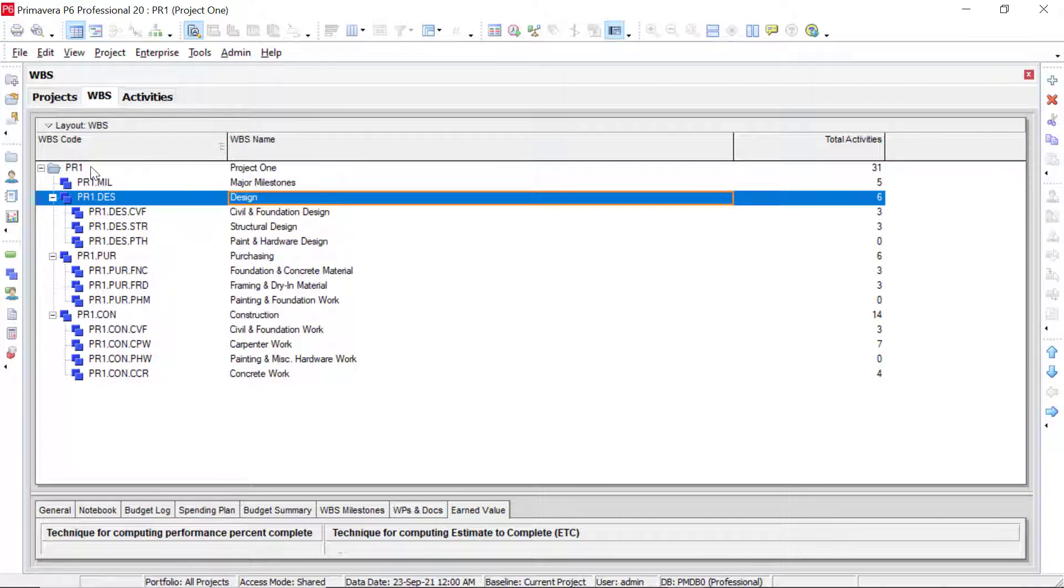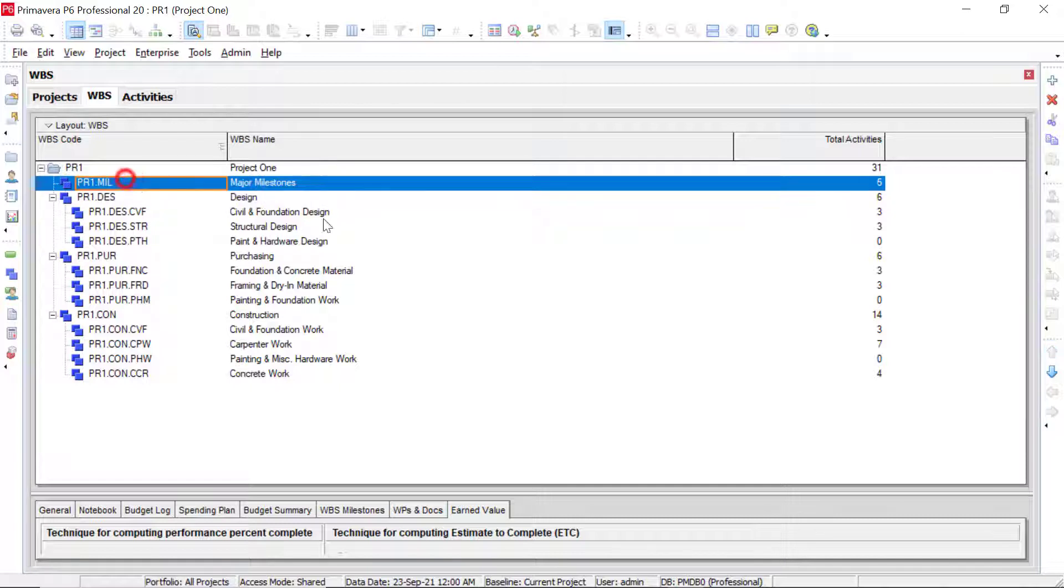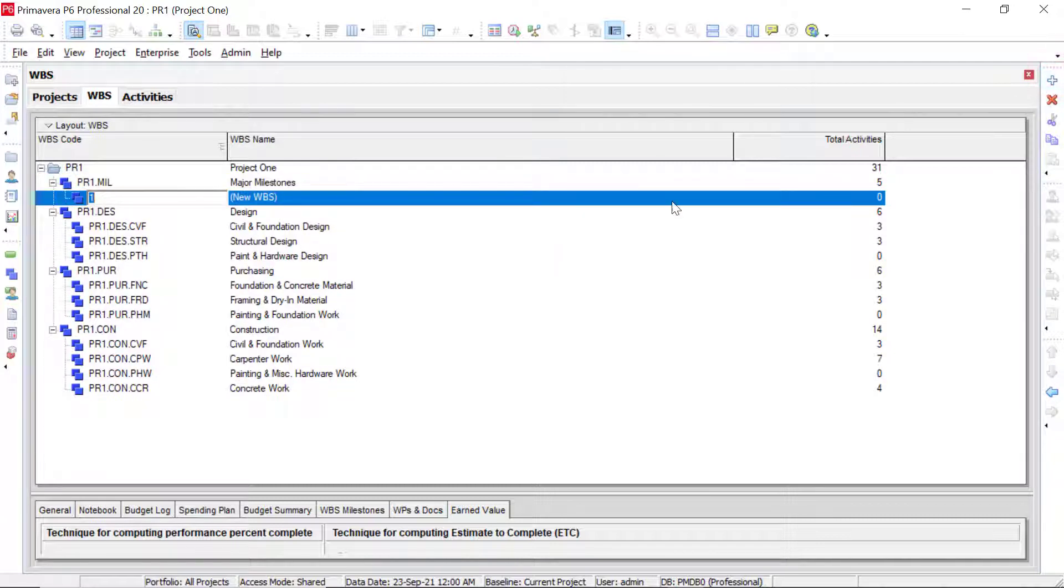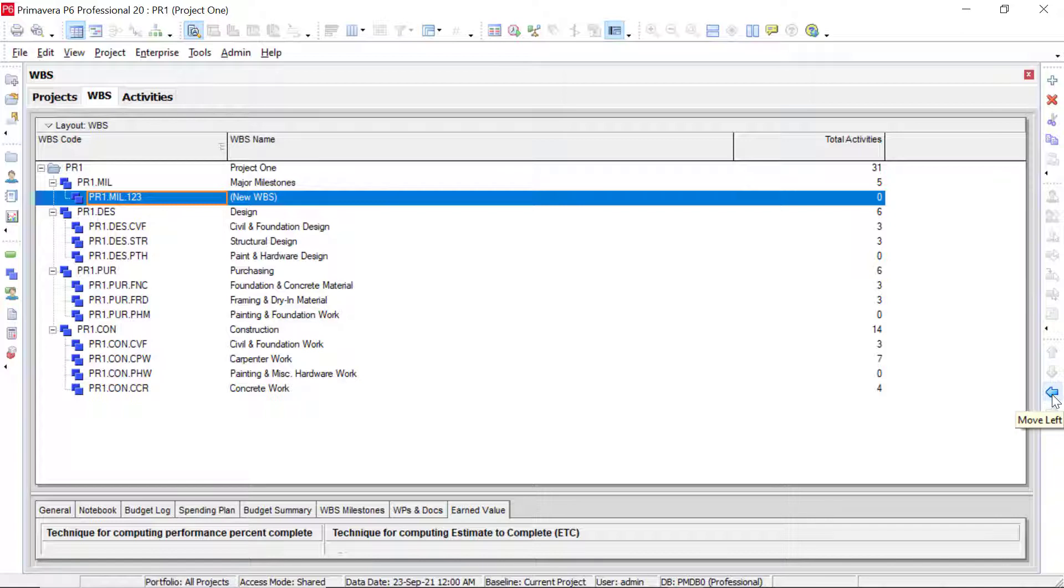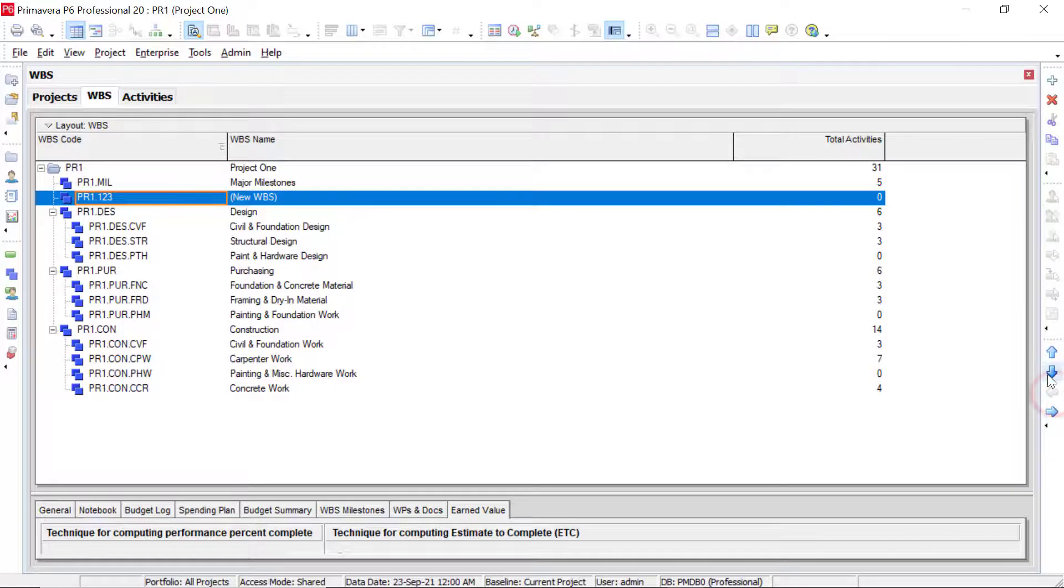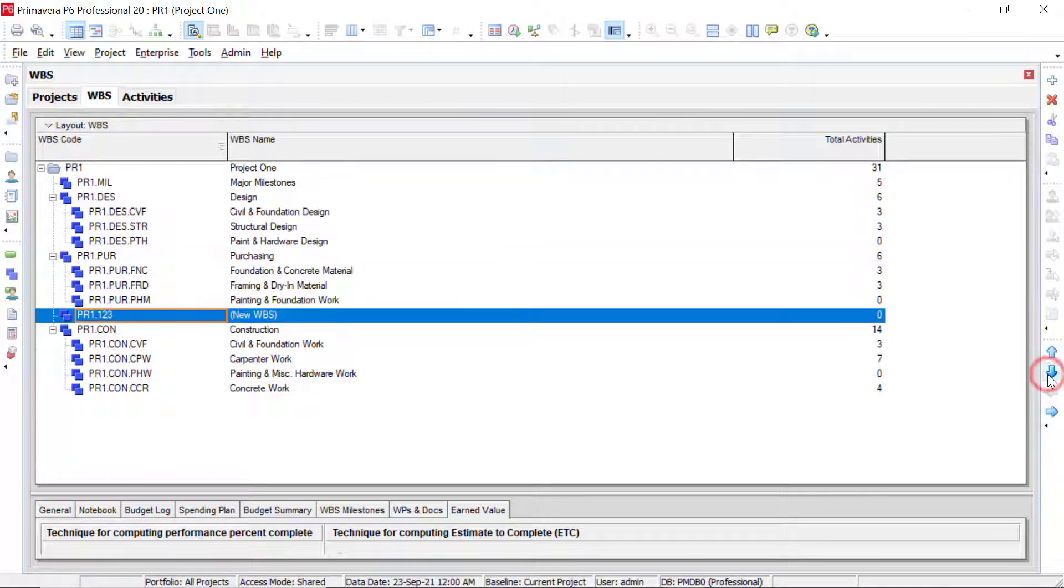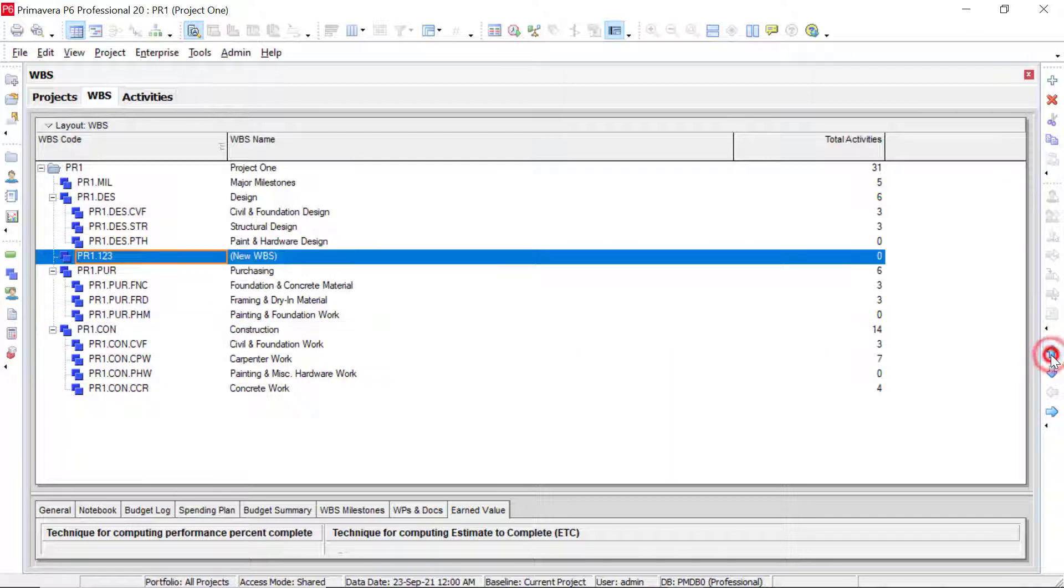Also when adding in new elements, we are able to shift them around within the WBS. So let's say that we add in another one underneath our major milestones. I'm going to select the plus sign up here on the right. If we wanted this one to be a second level instead of a third level, then we can move this over. We can use a few different methods to move it over. So notice on this side over here, we have these arrow keys. And so our only option that we have right now is to move that to the left. So we can click that. Once we move that to the left, notice we have other options that open back up, like we can kick it back to the right. Or we can move it up and down throughout the WBS.